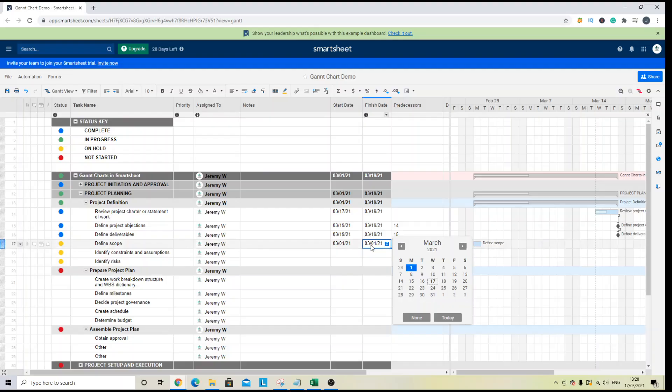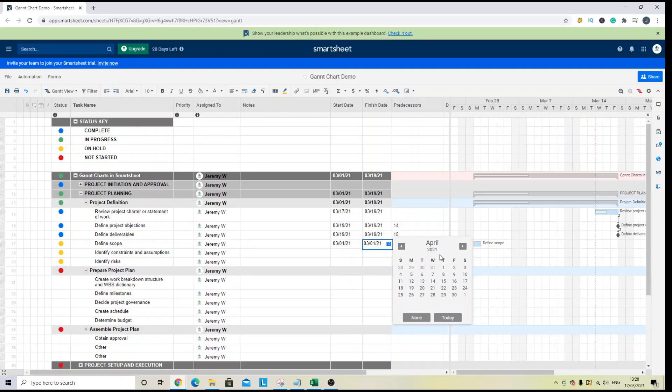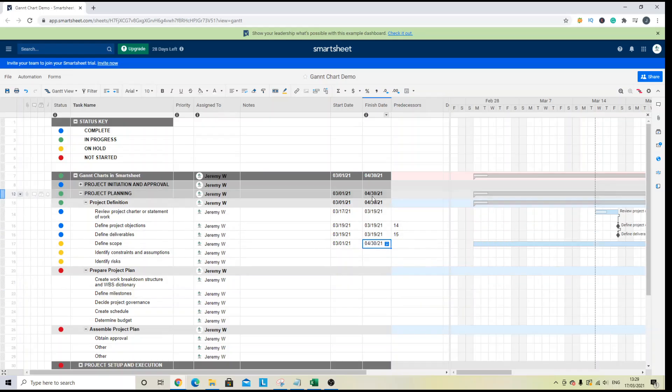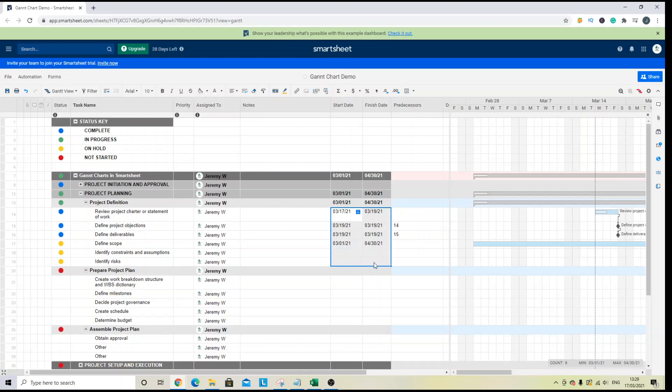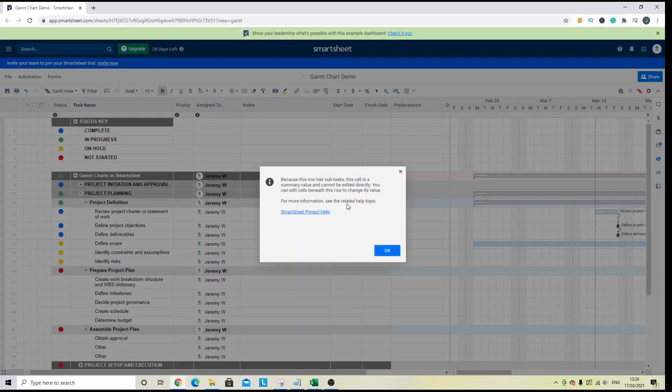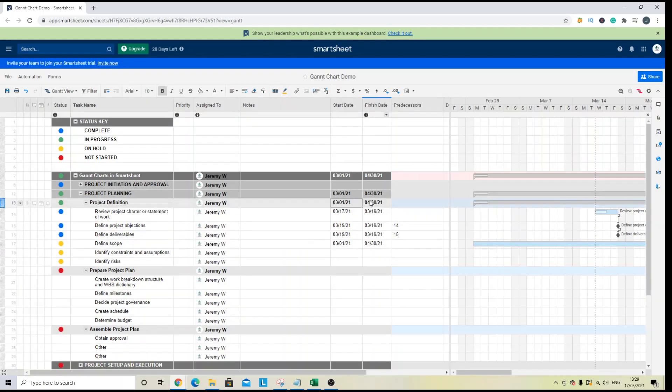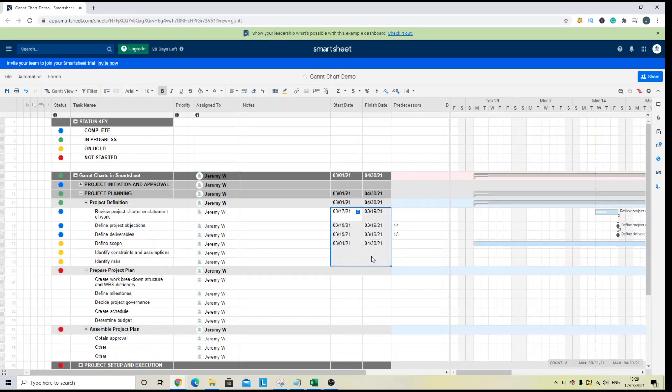the finish will look for the last date within the column. So if I change that to the 30th of April, then that will update here. So it always takes the last date that it can find in the child tasks below. And you won't be able to update these. It will roll up automatically.